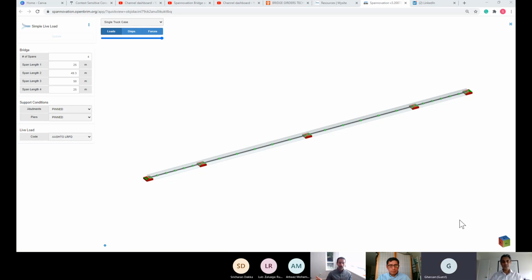There are a couple of ATCs, which we call variations in Canada, or in your part of the world, Harry, they're called alternative technical concepts. They're just mechanisms to maybe challenge the project criteria. But overall, there are 2 or 3 different configurations that we develop and price out, and then we pick a preferred one. That's the one that's quantified and then priced out by a contractor to bid. To answer your question, I don't want to leak the suspense before you actually get it, so I won't tell you which one wins, but we are looking at a 3-span and a 2-span situation there.